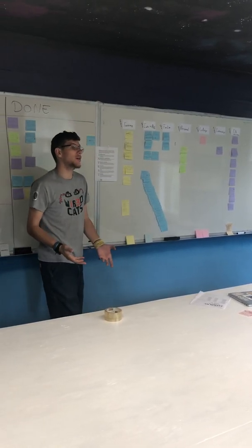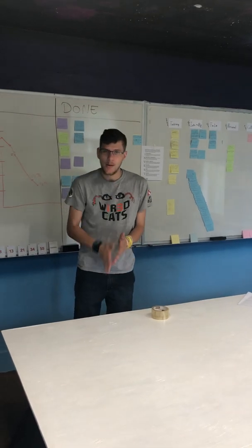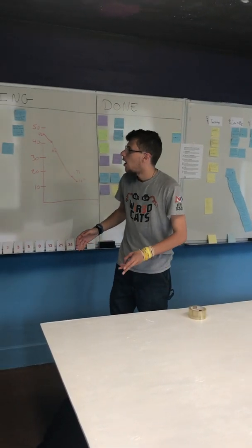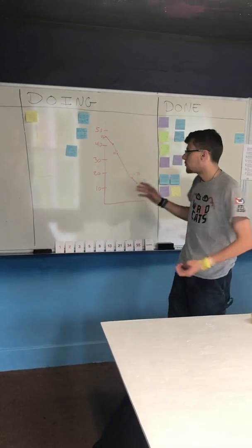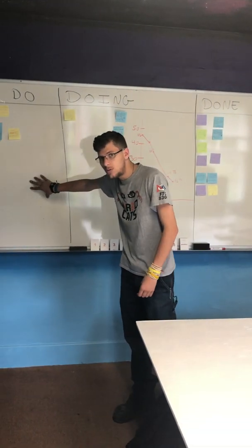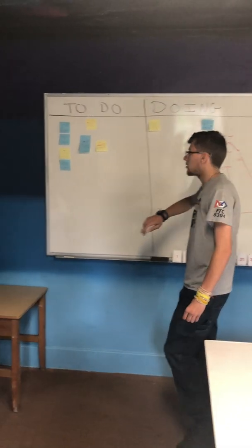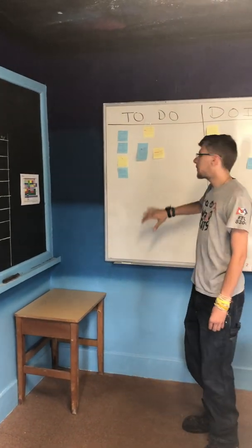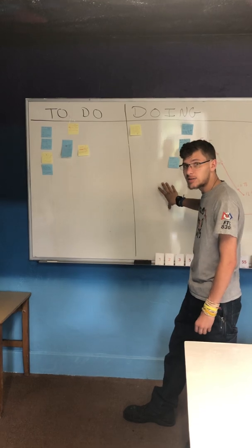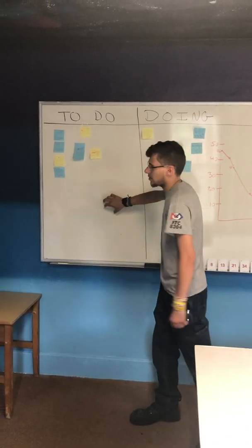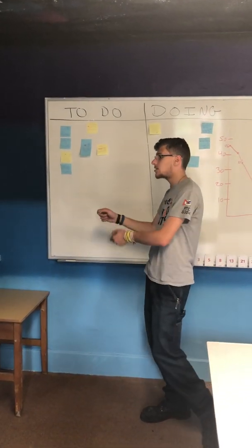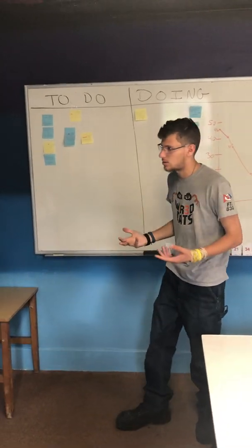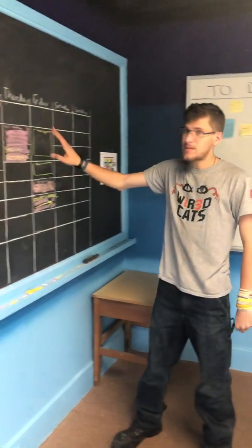If any user stories are too big, they get chopped down and separated. Then we move stuff over to the to-do and pretty much fill this up enough so we have enough for the next sprint and some extra to pull into the sprint if we run out of things to do. That's my Thursdays.